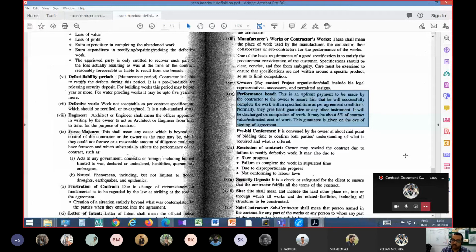or during the tendering process, an amount of money was already paid as an earnest money deposit. So with the person with whom you are signing the contract, his earnest money may be converted into a performance bond. Or suppose his earnest money deposit was 10%, but 10% was too much to show his earnestness for bidding. You only need 5% of the performance bond.